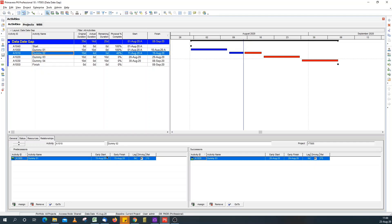An easy way to verify out of sequence logic, you check the predecessors of your activity. If the early start date of any of the predecessors is greater than the data date, then you know that predecessor is out of sequence.